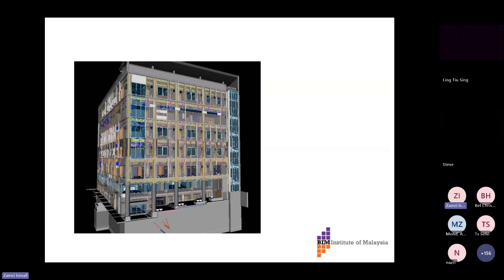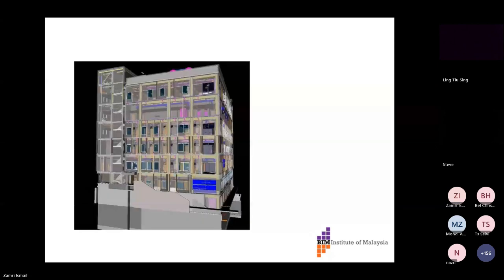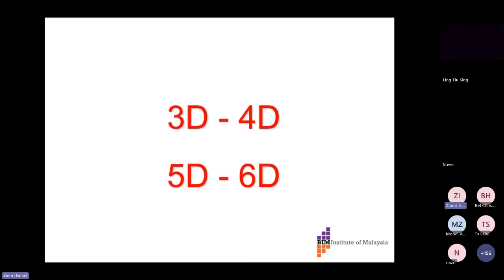in the end, the architect normally charges their fee based on construction costs. But thanks to them being efficient, the client pays them less, because in the end they reduce the construction costs. So proportionately, the fee is also reduced. That is a reward, or rather a penalty, for being so efficient. It's a bit unfortunate, but they are happy because they produce good quality, produce on time or even ahead of time, and worry-free in that sense.